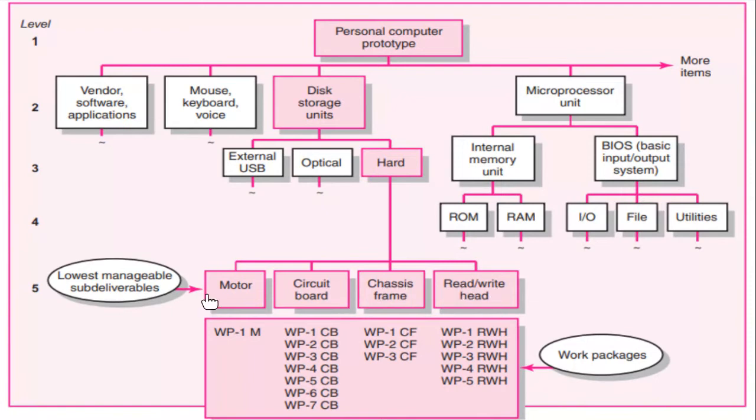So these are the 4 subcomponents required to create the hard drive. You can now cost each of these. You can now indicate the time of delivery for each. You can now determine the resources required for each. All of these add up to create your hard drive.